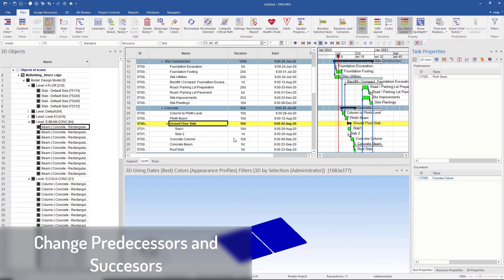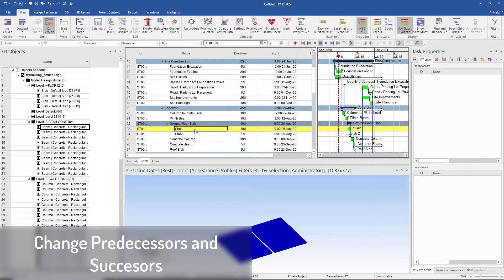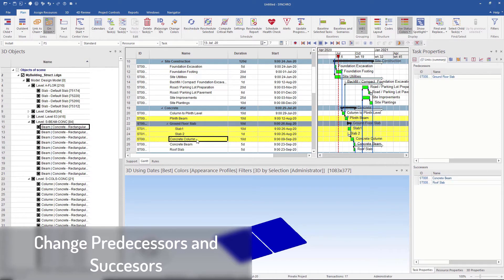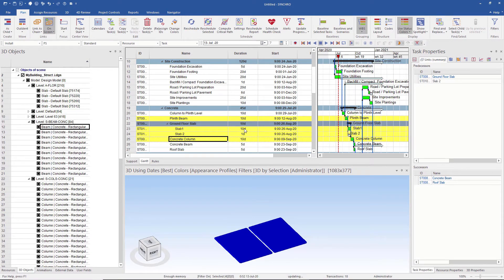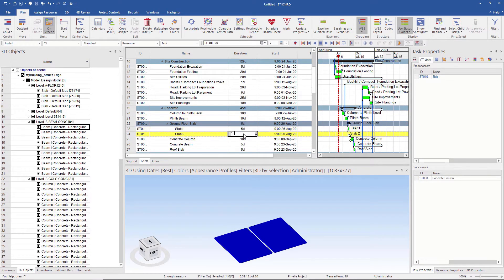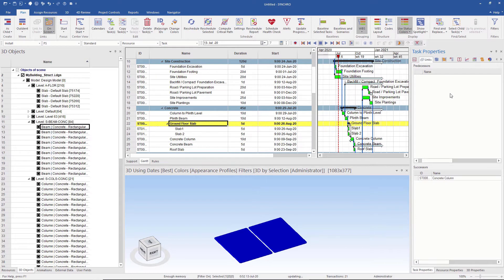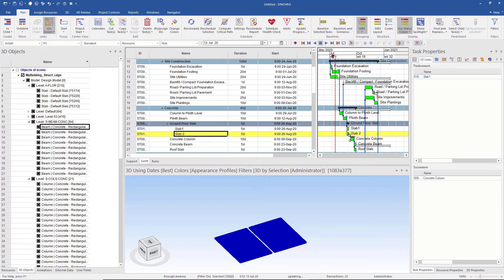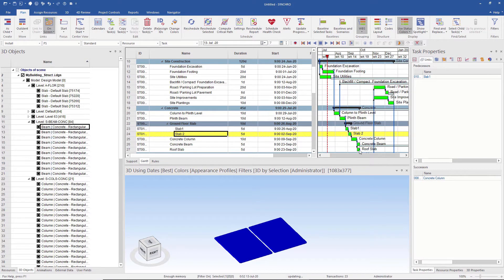This is only for the task Ground Force Lab. We have to add links to the newly created tasks. To create a link, we select the tasks sequentially in the order we want: first Flint Beam, then Slab1, then Slab2, and last Concrete Column. After selection, I click on Link as Chain. I change the duration as per requirement. Then I remove the links from the parent task, since we have already added the links for the child tasks. Now I click on Read Schedule to see the changes reflected in the Gantt chart.